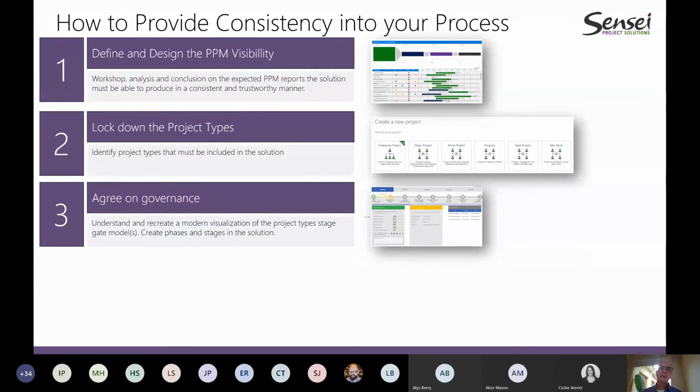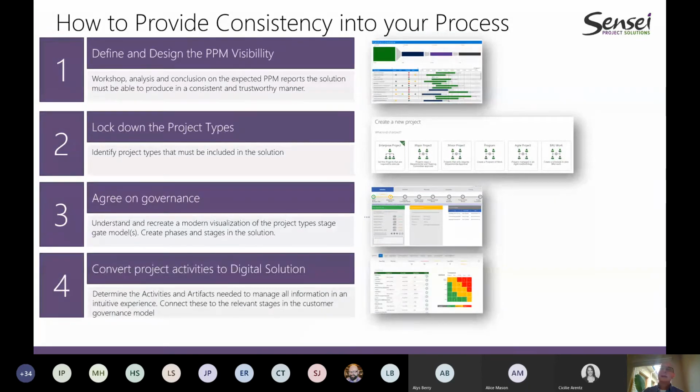Now, once you have come up with that governance, then implementing the capability is actually not all that difficult, especially if you have a project portfolio management solution where you literally have project types, and once you create that project, you then automatically have the appropriate stage gate approvals. So this is how we generally design our stage gate approval processes, starting really at the top, ensuring that we understand what kind of budget approval processes need to happen, and what kind of final execution processes need to happen in order to execute and close a project.